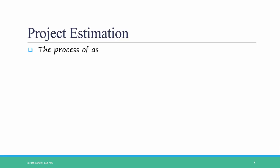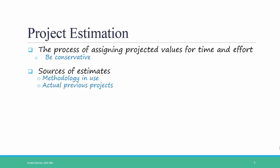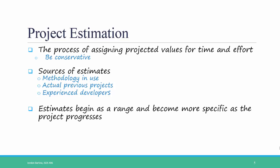Project estimation is the process of assigning projected values for time and effort towards an IT project. This includes scheduling and staffing issues. Always be conservative when estimating how much time and effort you'll need, because you never know what turns a project is going to take. There are many sources you can use to create estimates: first, by the type of development methodology you're using, such as Waterfall or Agile methods; second, based on actual previous projects you've managed; and third, by speaking with experienced developers who have worked on similar projects. At the beginning of a project, estimates begin as a range but become more specific as the project progresses.